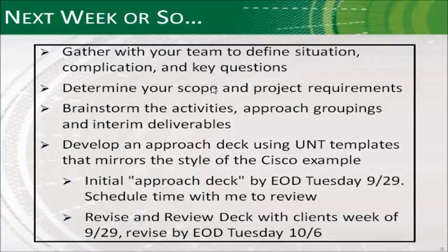Then as your group, you should be brainstorming all the stuff that needs to be done. Don't try to start project flow planning it. Just brain dump everything that needs to be done in order for you to be successful. And then once you think you've got this completely exhaustive list, start drawing circles around the things that are likely to be grouped together and start bucketing them in a logical staged approach, right? So that your overall project plan is MECE. It's exhaustive in nature, but each grouping of activities is also mutually exclusive from the next, and you don't move on to the next set of activities until you get your preliminary activities done.